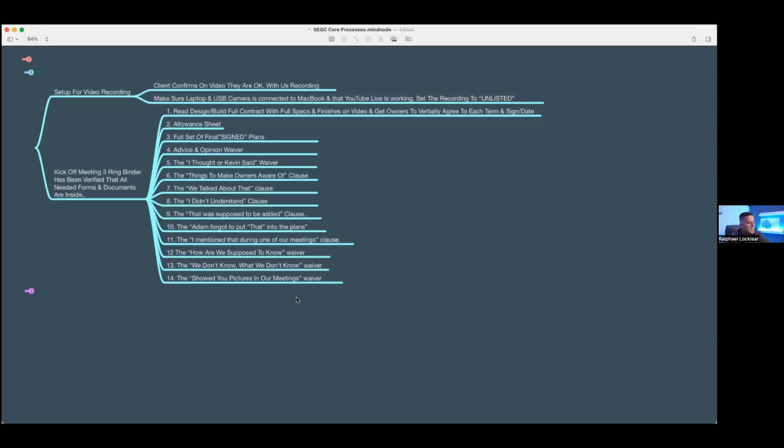You see what I'm saying? And that's what all of this is for. Adam forgot, I mentioned that during one of our meetings. What was that? It's not here because after this meeting, once this is signed and recorded, we won't have the luxury of coming back, because I want to do a great job. But we have to pin all this stuff down, and we have to agree once we get past this that we're building to what the plan states. If it's not on the plans, please don't be upset, but this is what we agreed to.